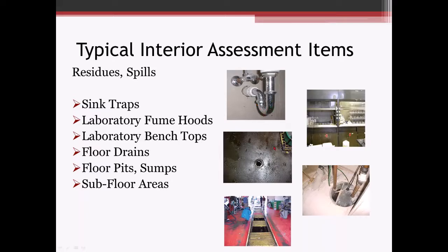Fume hoods, bench tops, floor drains, especially if you're in a garage area or type of area that might deal with automotive repairs, things like that. You're going to get oils and such washing down into those drain systems. So you might have some concrete that needs some cleaning prior to disposal, or you might have some sludge that you have to dig out and dispose of.